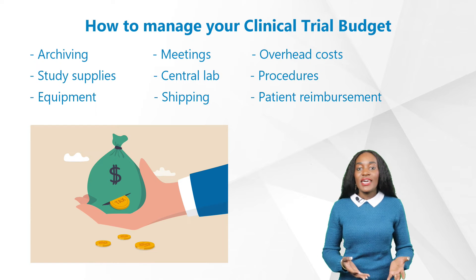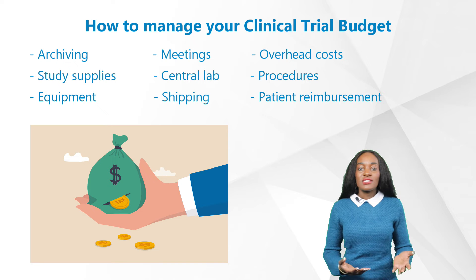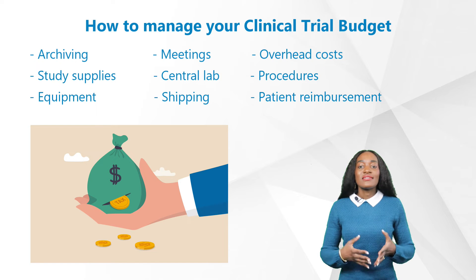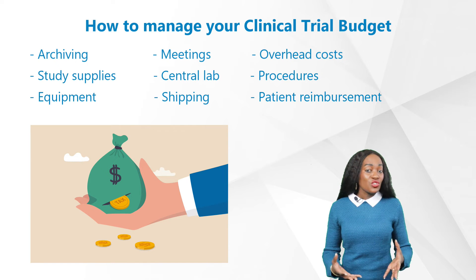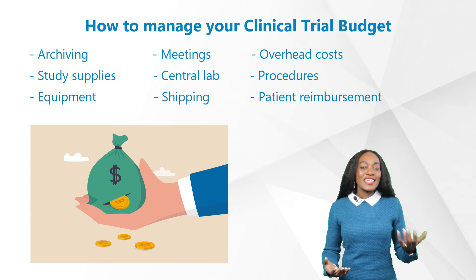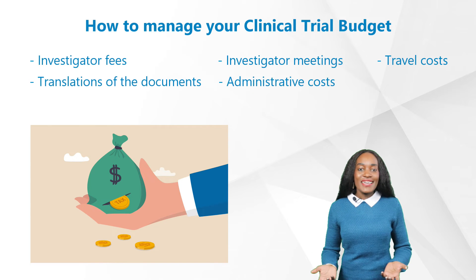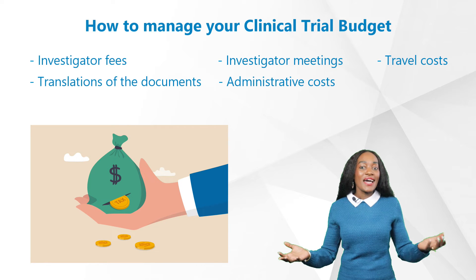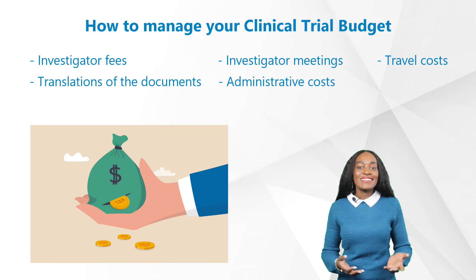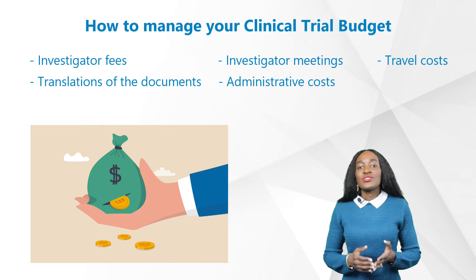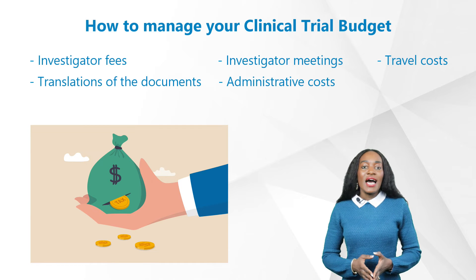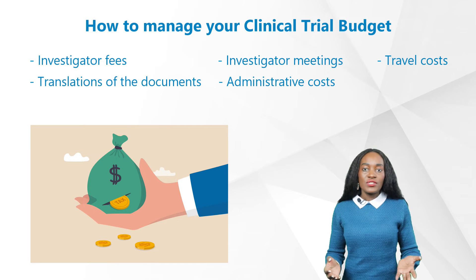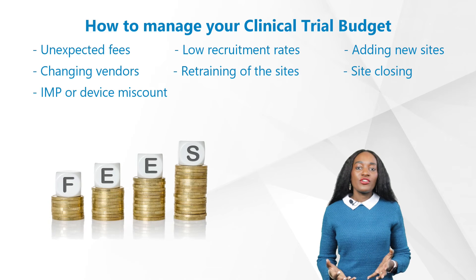You can also budget for biostatistics and medical writing, document management and trial master file archiving, and meetings for the study team to unify their trial activities and ensure a smooth study run. Additionally, expect overhead costs such as patient recruitment, study supplies, central lab procedures, equipment shipping, patient reimbursement, and investigator fees — especially if a private clinic is involved, as costs can be higher. Investigator meetings, travel costs, and translation of documents are also typical overhead items.